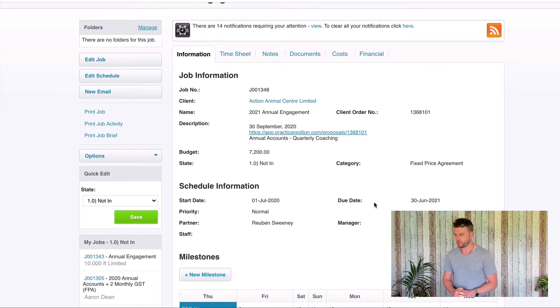Those are the five things we want to check: first, is the budget entered — if not, look at what the proposal says in Practice Ignition. Then enter the job category, check that the partner and manager have been entered, and finally check the estimated times on all tasks. Getting those five things entered will set us up for great reporting — we can easily see whether we're going over budget on a task, filter work in progress between fixed price agreements and billable WIP, filter by partners and managers, and have a nice apportionment of the budget across all tasks.